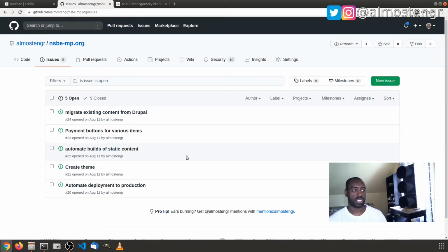And the proper way of doing it, although you don't have to, is you make your commits to an existing issue or user story by including that issue number or user story number in your commit message. Then the system will be able to track it.